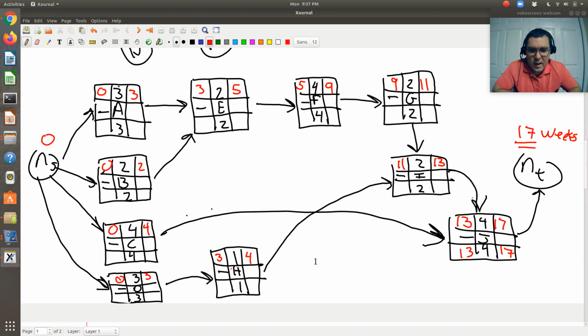So if I look at I, I is only dependent on J. Going backwards, I is going to follow J. So if the latest possible starting time of J is 13, then the latest possible finishing time of I is going to be 13, has a duration of 2, so the latest possible starting time is 11.